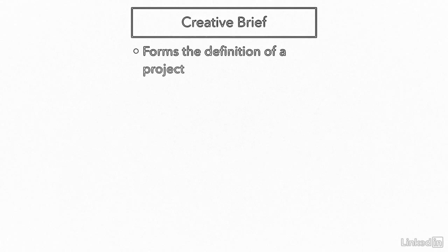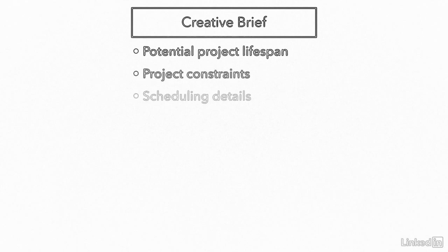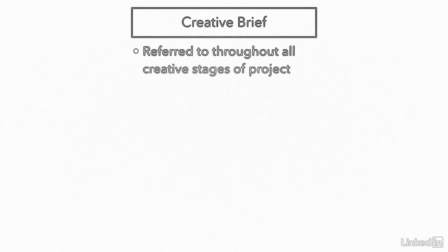A good creative brief is developed by the client and/or the designer, and quite frequently together. It forms the definition of a project and needs to inform everyone working on it of its goals, scope and vision. It'll identify the target audience, the overall objectives and the potential lifespan of the project, along with any constraints and some scheduling details. It's this that you'll refer to throughout the phases to ensure that the ideas and the work are meeting those objectives.